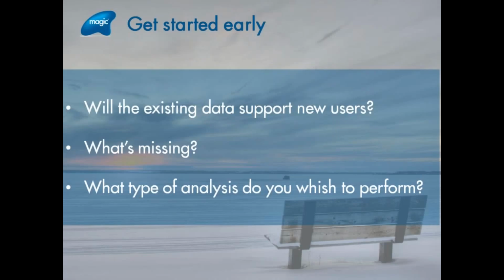Understanding the quality of existing data, especially in the legacy system, is a huge pitfall that companies often don't spend enough time on. Questions to consider: Will the existing data support new users? What's missing? And what are you planning to do analysis-wise that you're not able to do today? A detailed assessment makes it easier for companies to estimate the amount of work required to migrate legacy data successfully, and completing this assessment simply takes time.